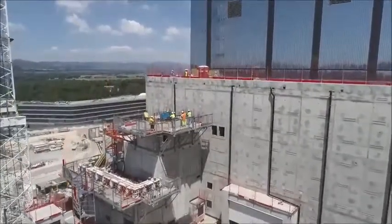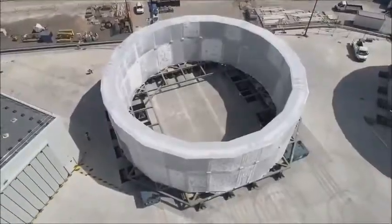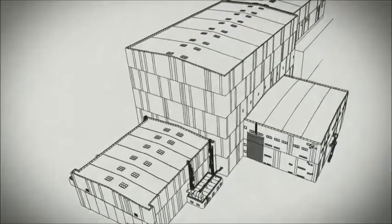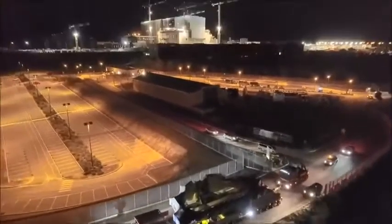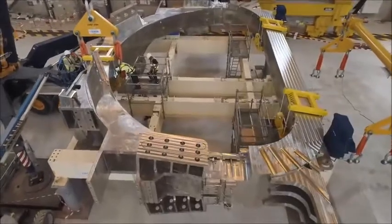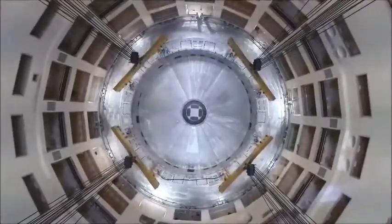Despite the challenges of the COVID-19 pandemic, we have managed to maintain critical activities on the worksite, including the reception of a number of ITER's exceptional first-of-a-kind components. In March, the European domestic agency, Fusion for Energy, put the finishing touches on ITER's assembly theatre. A vast hall for preparing, then installing machine components. In April, the first 2 toroidal field coils, superconducting magnets weighing 360 tons each, arrived from Italy and Japan. In May, the 1,250-ton cryostat base, supplied by India, was successfully positioned in the tokamak pit.